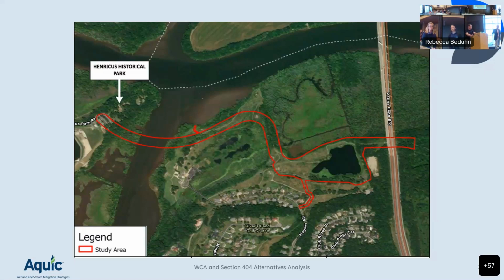High quality wetlands, lot going on. It's navigable water most likely. And remember, we have more than the Clean Water Act, the Rivers and Harbors Act too, a whole other regulation to comply with. So we're not going to pretend all things are equal when they're not. So we'll give you that feedback. Another huge advantage to a pre-app meeting: we give you some of that. We've got to tell you what to expect right up front.